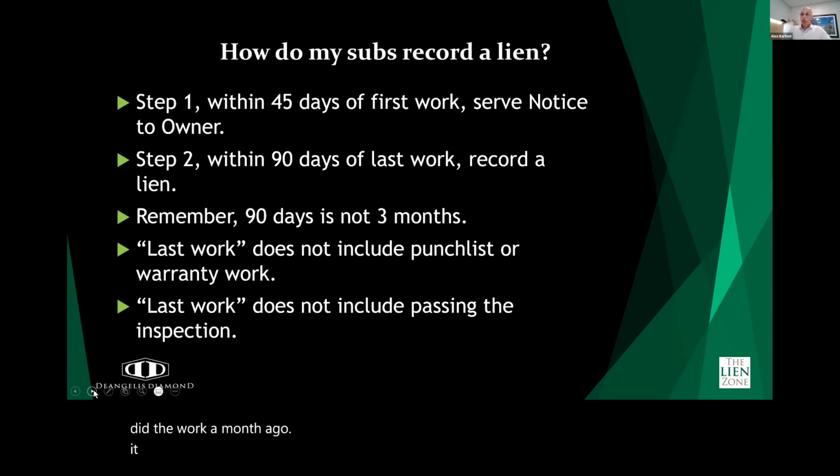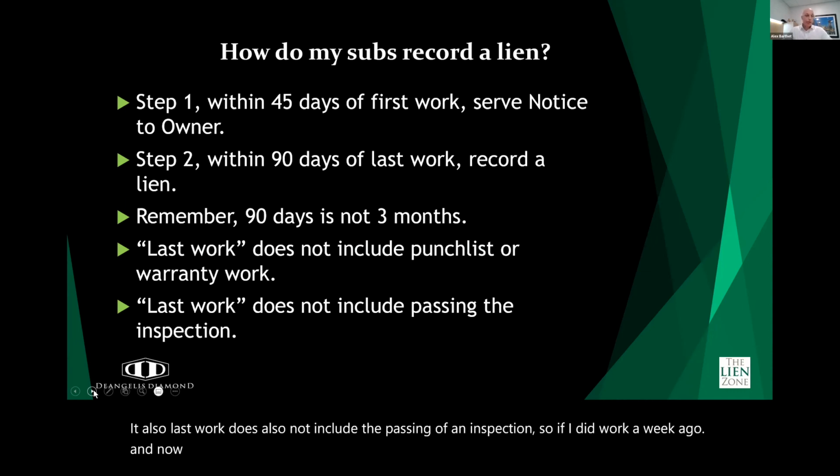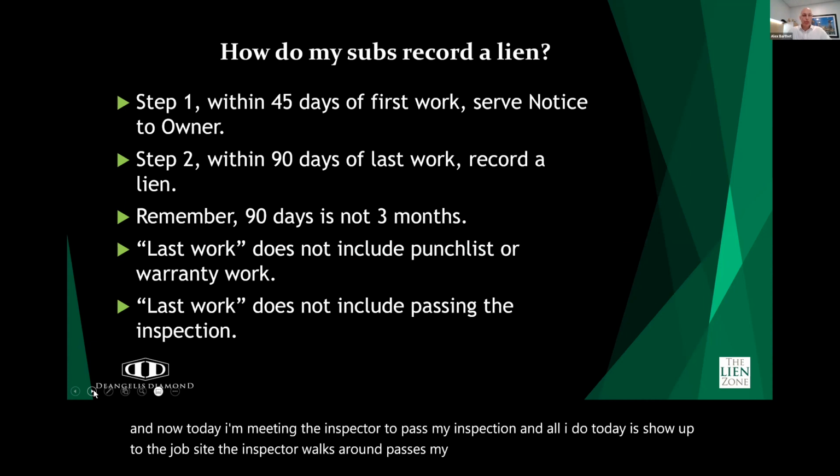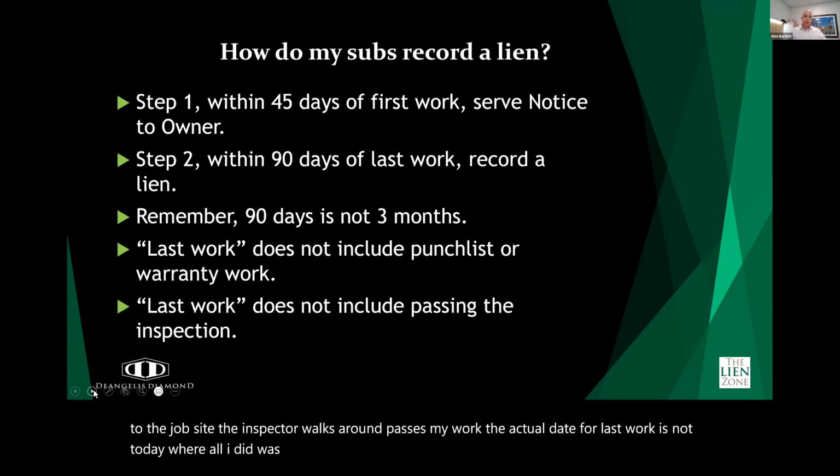Last work also does not include the passing of an inspection. So if I did work a week ago, and now today I'm meeting the inspector to pass my inspection, and all I do today is show up to the job site, the inspector walks around, passes my work, the actual date for last work is not today, where all I did was pass an inspection, but it was a week ago when I actually did substantive work.